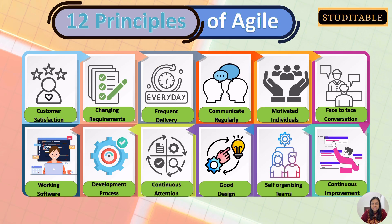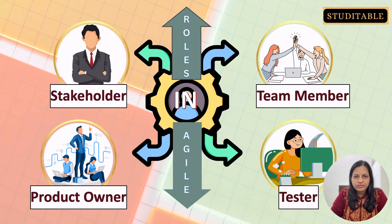Agile follows 12 principles, which are the building blocks of what Agile actually is. Any company claiming to be Agile must follow these: customer satisfaction, embracing changing requirements, frequent delivery with sprints running two to four weeks, regular communication keeping the client in the loop, motivated individuals, face-to-face conversation, working software, a continuous development process, continuous attention to good design, and self-organizing teams.